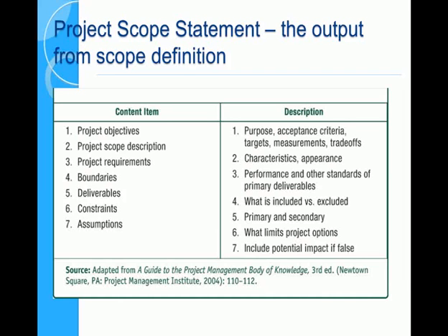Assumptions are things that we believe to hold true. The 3 examples that we looked at in the class was 1, we assume the project management plan is based on the assumption that when we clear the land to do the patio, there's no limestones or anything under that plot of land, because if there was, we'd have to have a new project management plan.